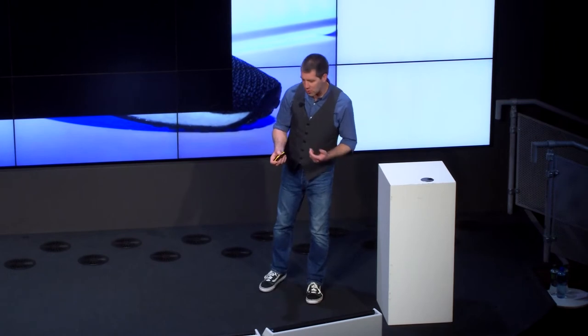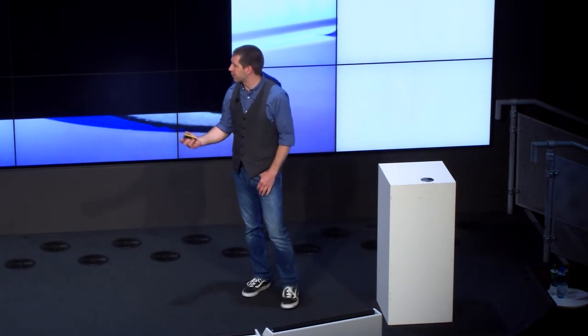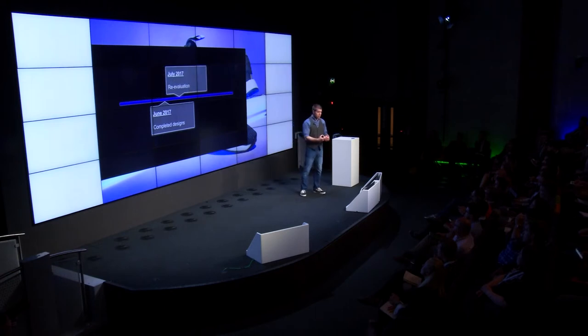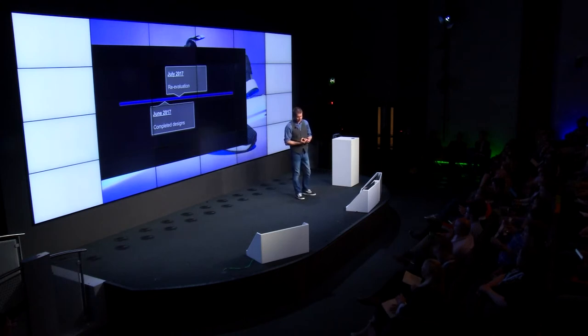We appointed them in the spring and they kept coming back and we came up with some designs pretty quickly. We completed the designs by June, fantastic. That was June 2017 and this just went live. Well, what happened? It was huge. What they came back with was that we were never going to be able to build this, and never going to be able to build it in a way that we could guarantee that conversion wasn't going to go backwards. There were just too many changes, too many risks in there.